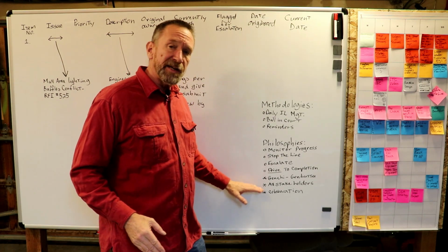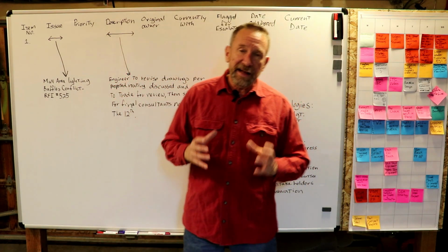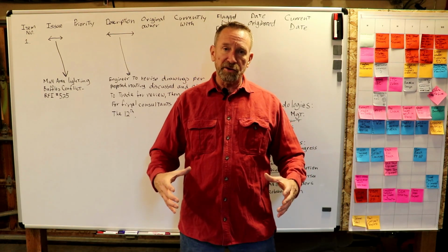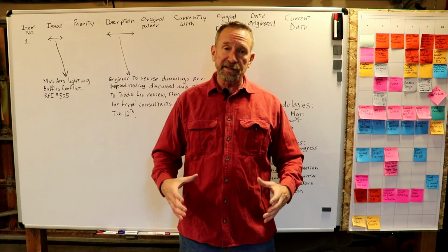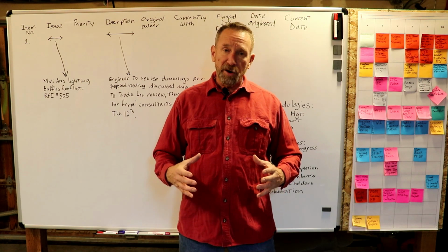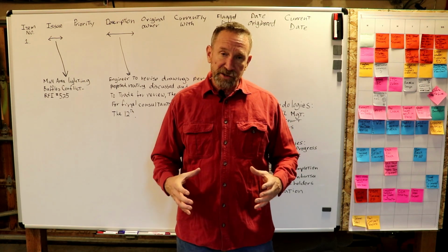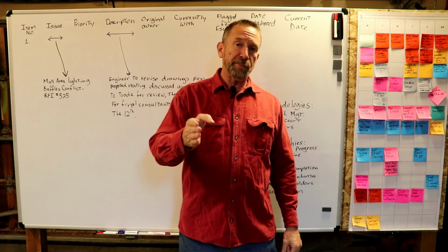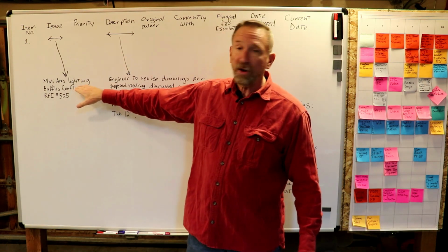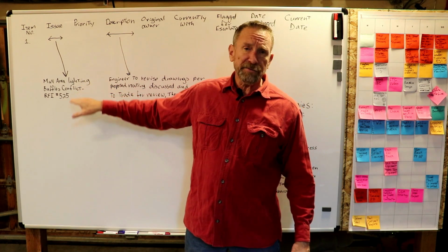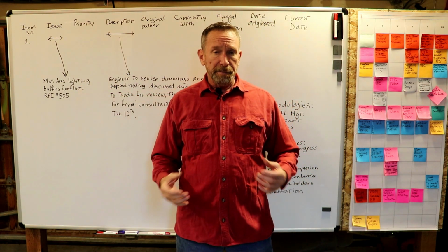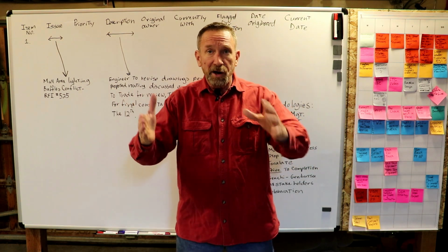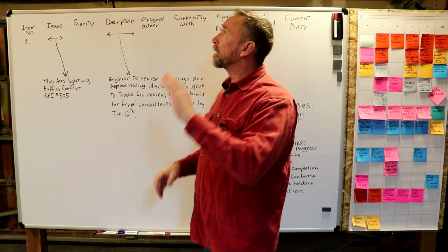With all the right stakeholders, and you never, ever define a problem before you get all the stakeholders together, or you will lose them. This is a lesson that none of us should have to learn the hard way. We should all get to really absorb this one up front, and that is, I can tell you what the problem is, right? I can say, hey, mall area lighting baffles conflict. I can say that. But then we all get all of our information, we get all the stakeholders together, we go out there, we stand and we look and we start talking.